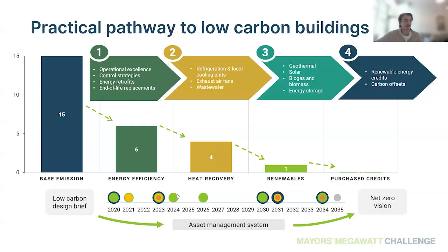Cost of ownership, obviously, we always recommend proper equipment maintenance and repairs. If you're replacing your domestic hot water heater every 5 years, it's going to cost you more over 30 years than if you're able to replace it every 15 years. Another example for that is we don't recommend replacing a furnace that you put in 2 years ago. It still has a lot of life expectancy left. Let's stage our low carbon options to implement the new measure when the existing unit is being replaced anyway.